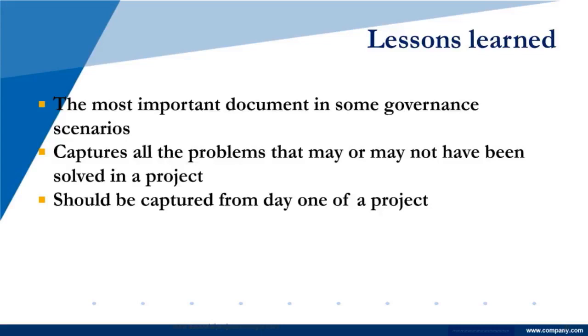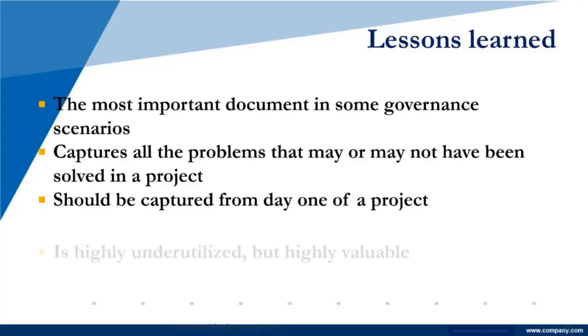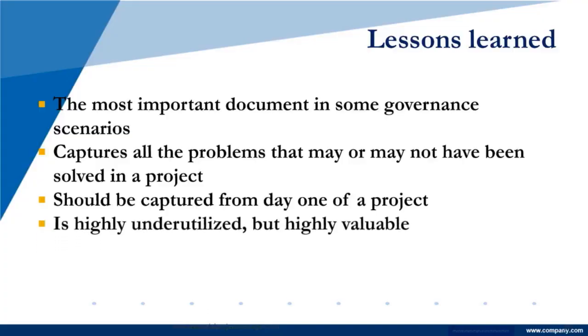And as I said, capture it from day one. Capturing lessons learned at the very end, you're going to forget things. And you don't have to have it formal. That's why I say it's a very informal piece of paper, just bullets is fine to begin with. The formality and how you report your lessons learned is really a part of the culture that you're in. Your particular project management office or organization will somewhat influence, if not dictate, how that's done. It's very valuable. I can't stress it enough.